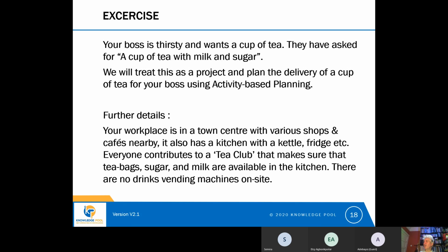If you don't have that knowledge yourself of how the work breaks down, you will need to find subject matter experts that can tell you, right, if you want to build a bridge, these are the main stages in building a bridge. This is how the first stage breaks down. This is how the second stage breaks down. So you may need to find subject matter experts, and you may need more than one. You might need an expert in designing foundations to design the foundations. You may need an expert on designing bridge superstructures to design the bridge superstructure.